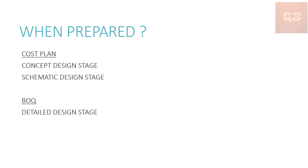These stages move forward in percentage terms. Initially it will be the concept design 50% stage, where just 50% of information is available. Then slowly you prepare the cost plan with whatever details are available. The concept design stage then moves to 100%, with a few more reports and details. Then it moves into the schematic design stage — starting at 50% or 20% and progressing to 80% and then 100%. As the stage moves on, the cost plan also gets updated.